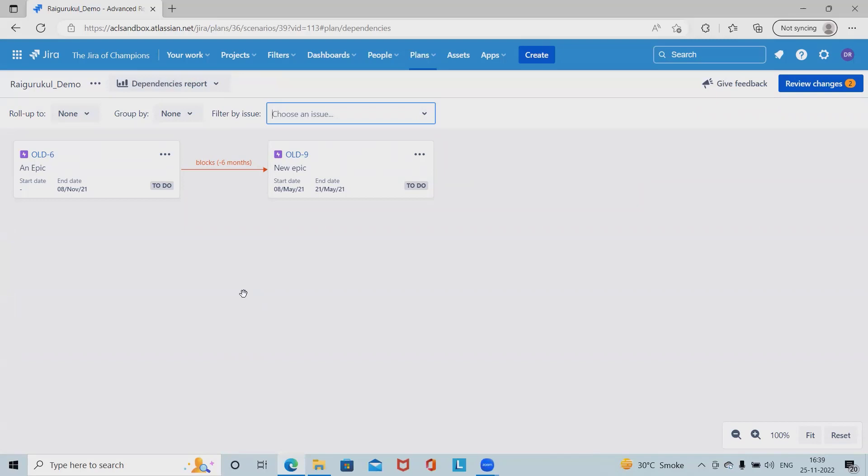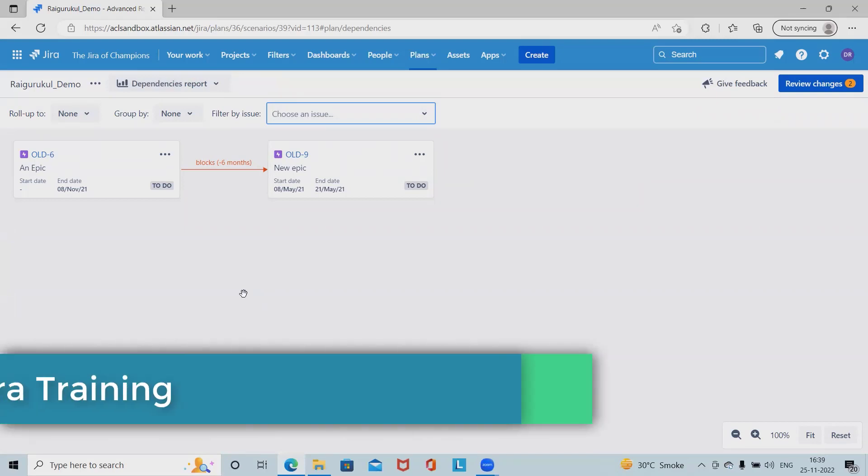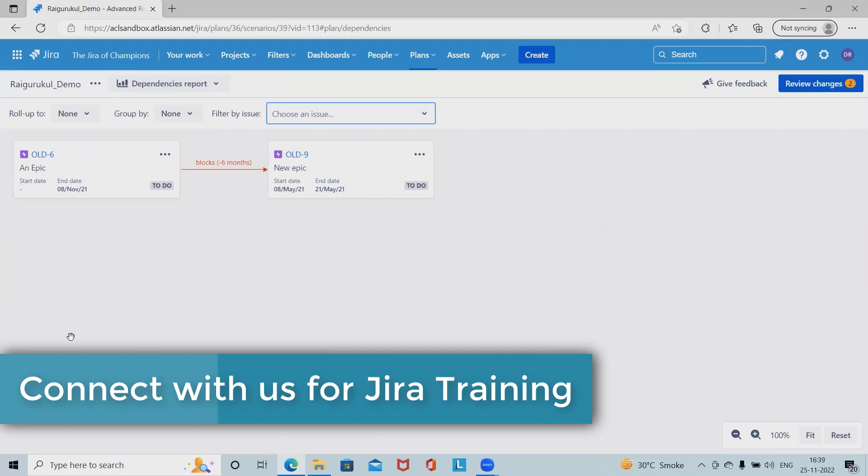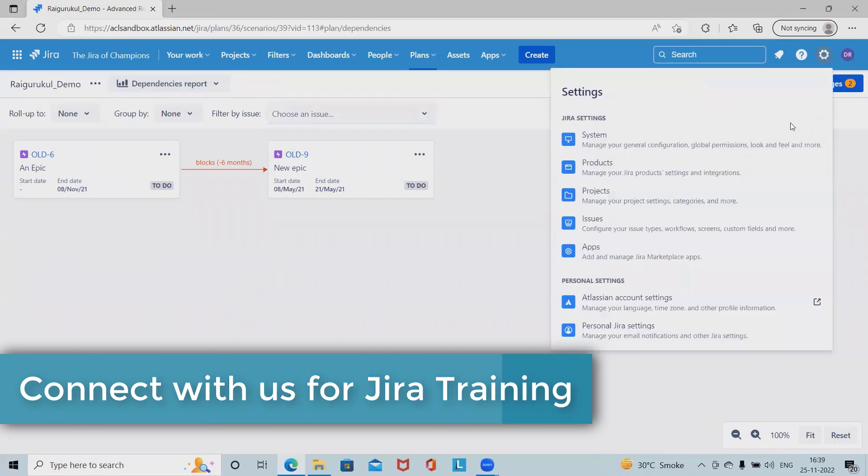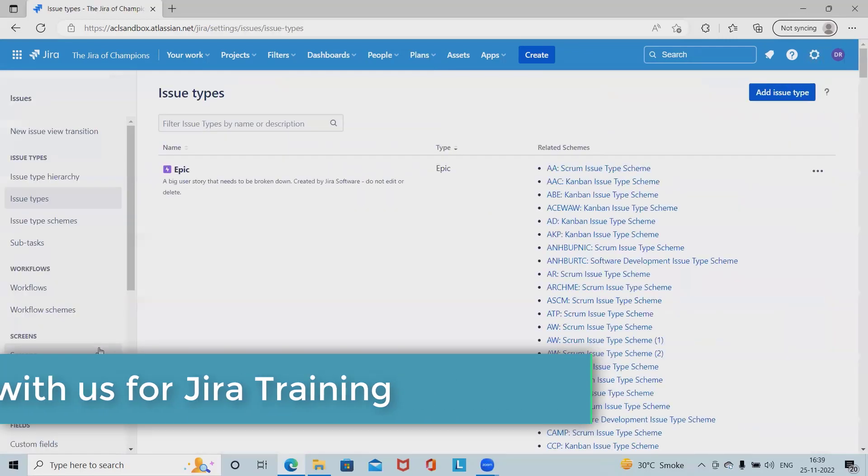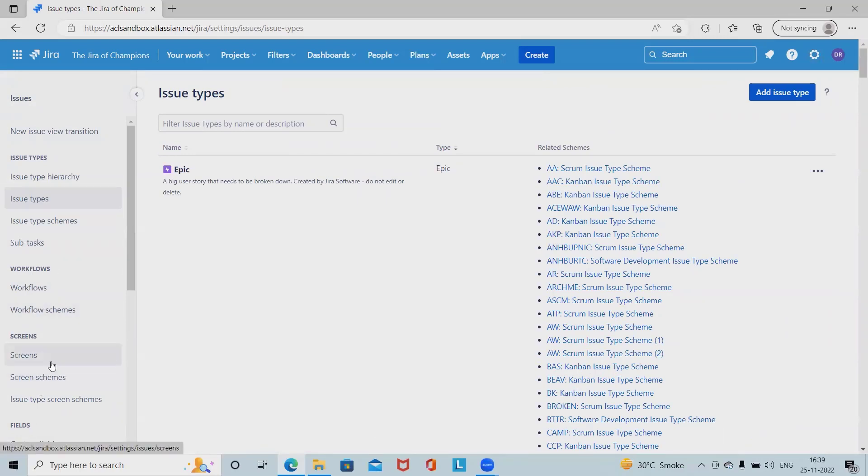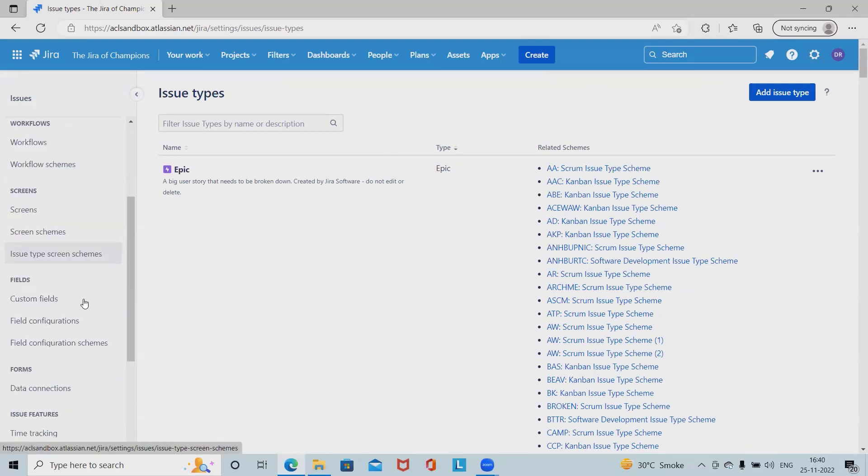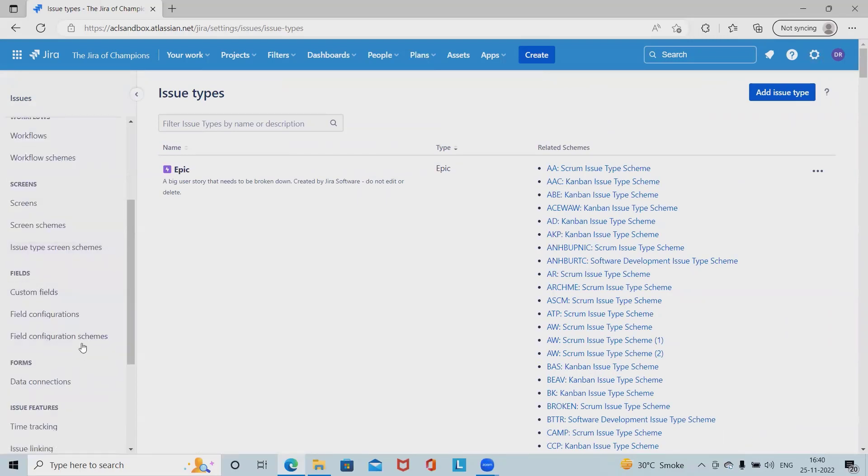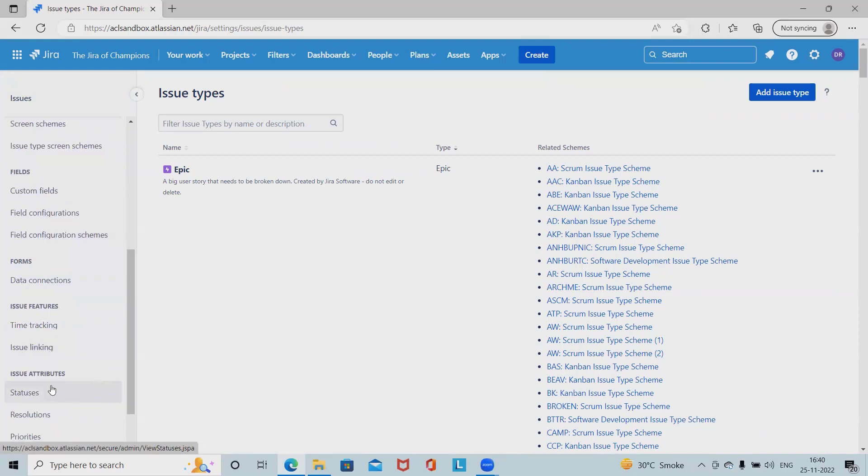From configuration point of view, we have two steps. One is configuring our issue link in Jira. In configurations, we have to go to the issues and then in the left hand sidebar, we have to click on issue linking.